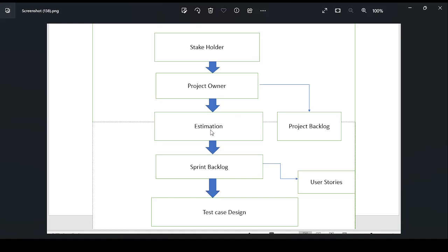All the team members, the Scrum Master, and the Project Owner are present in this meeting. The motto of this meeting is to make a plan for how to create the project according to the requirements. Whatever requirements are present in the project backlog are sorted in this meeting, the ones required for development of the project. Once the requirements are sorted, they are nothing but the user stories. Those user stories are explained by the project owner.